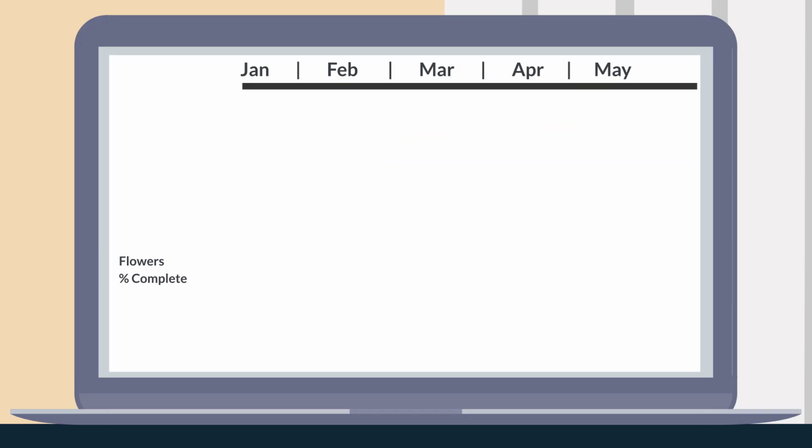Let's add the flowers line to our project plan. I budgeted $1,500 in total. We'll allocate the budget based upon the percentage grown in inches each month.